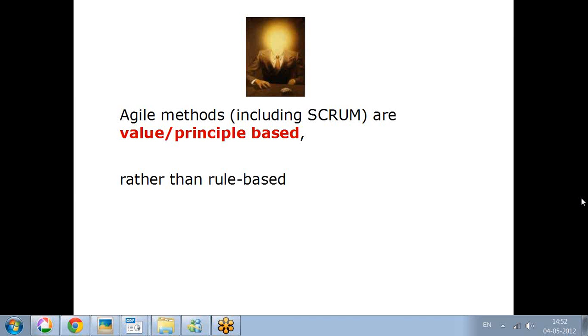Next question is, what could be the ideal sprint cycle duration? Maximum is 30 days. We have done sprints of 5 days duration. We have done it for 15 days duration. It all depends on the size of the product and the trust level between the product owner and the team. It all depends on how many days the product owner can wait to see the results, kind of.